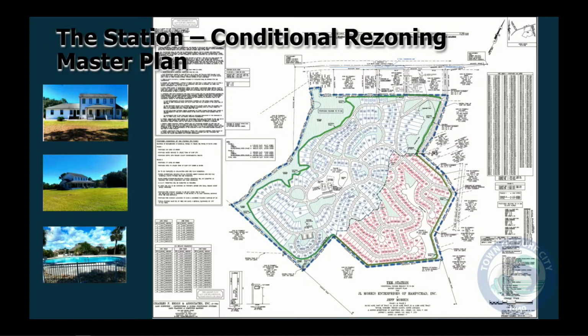With that being said, staff and the TRC have reviewed this concept plan. DOT has weighed in, and they support the condition of a TIA because the developer not only owns this tract, but owns some of the commercial tracts along the front, and DOT, along with staff, would look at that as a common development. So when they do their traffic impact analysis, it will take those into account too for their highest and best use.